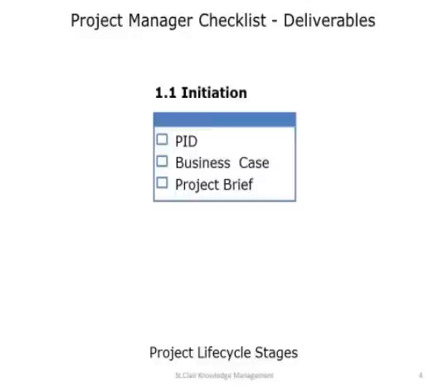So the brief is where you state your idea. The business case is where you go into a bit more detail as to how much it is going to cost, what options are available to us, and then once the business case is signed off, what you've got now becomes a project. Until the business case is produced and signed off, you haven't got a project, you've got an initiative, you've got a thing. The thing hasn't got any money attached to it, hasn't got resources attached to it, hasn't got any timelines, a plan attached to it. The business case does.